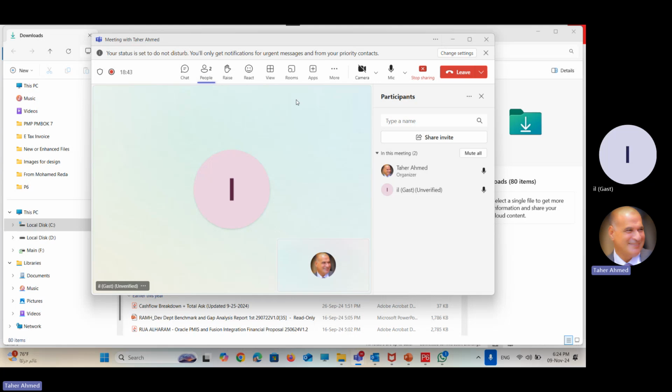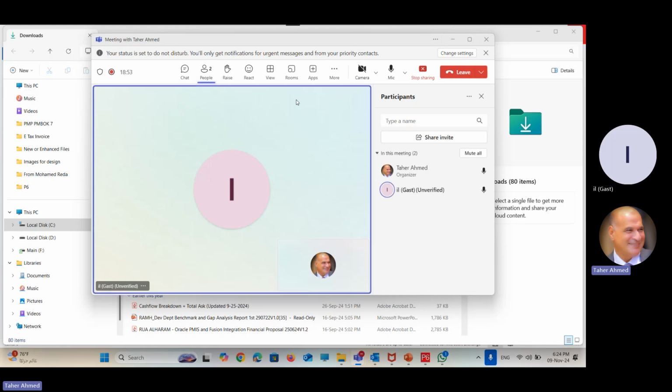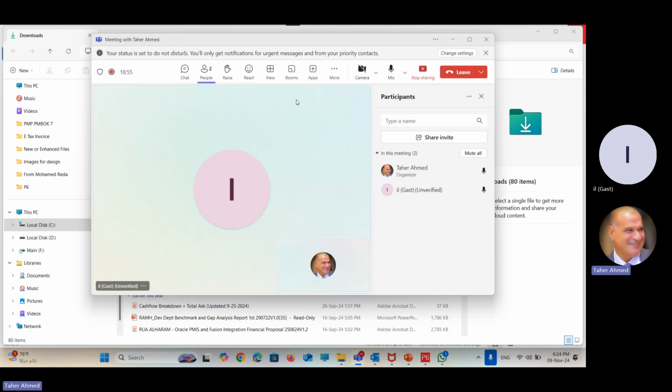As I told you yesterday, there are 3 ways to add a new project. The first one is File, New, which will open a wizard going step by step, next, providing the information in the wizard, and at the end of the steps you complete it, finish, and you create an empty project. It includes only the ID, name, and the start date of the project. Is there any other way to add a project to our database?